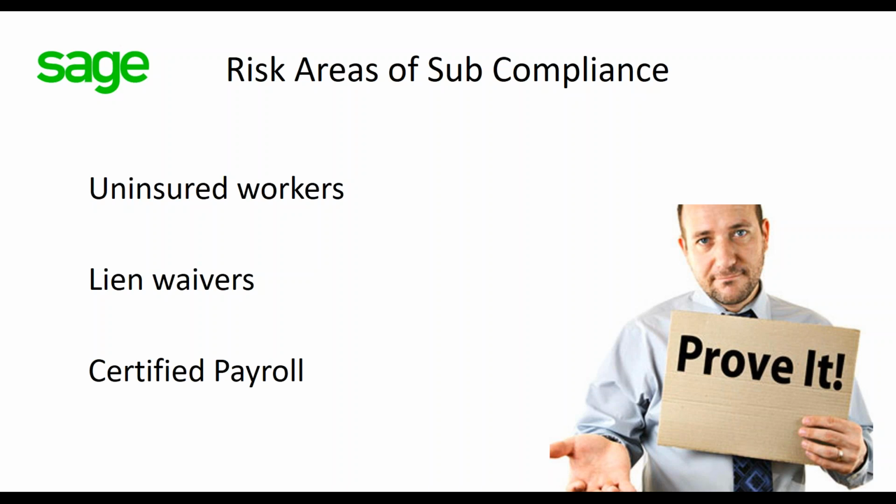You can jump on to Google, look up prevailing wages, your state name, and hopefully your state has this too, but at least in Oregon, a nice PDF popped up, and they update it twice a year, and you just look through it until you find the prevailing wage for the particular county and a job type, labor type, and there it is. There's the number with a couple of variations, and you've got it. So pretty straightforward.